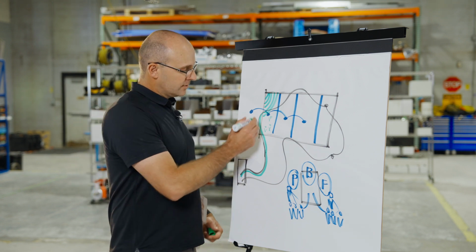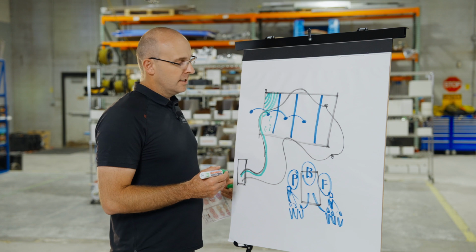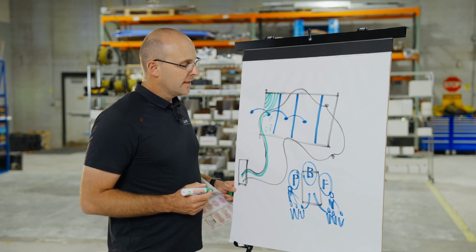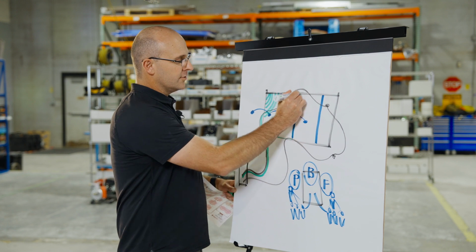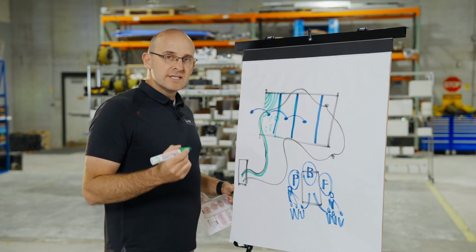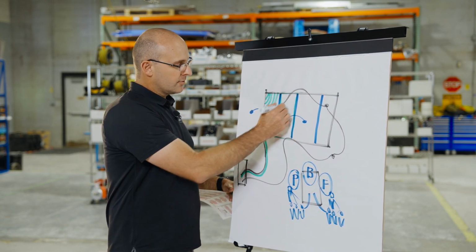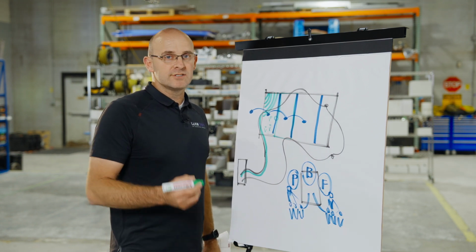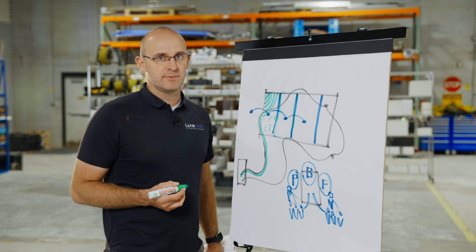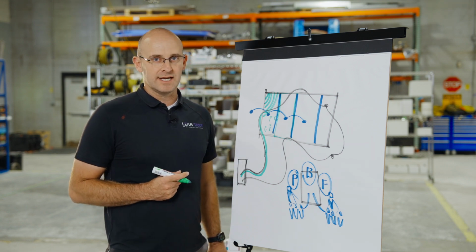And then say, you as the superintendent, hey crew leader, can I have 5 more minutes of your time? You are about to have this next zone handed off to you tomorrow. Let's walk it. Let's walk through it. What do you need done? What materials do you need moved? What things do you need finished? What inspections should be done? What cleaning do you want done ahead?